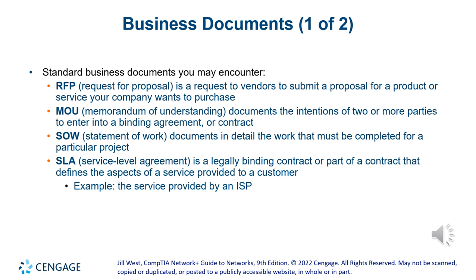That's the document that details exactly what the company is going to do for you. And when I say exactly, it means exactly. They won't do one thing extra unless they modify the SOW and charge you more. They can do less, but they will do exactly what it says there. So if it says I'm going to run and install 50 access points, and you're like, oh no, but this area has a little more, we need to install 2. It's like, no, my statement of work says I'm going to install 50 access points. So which of the 50 do you want me to install?